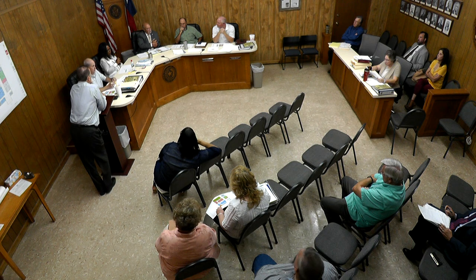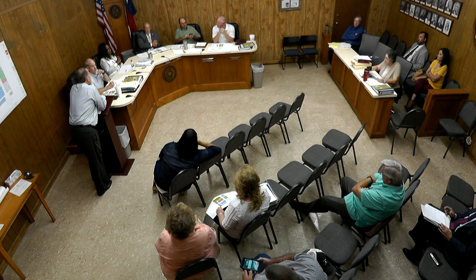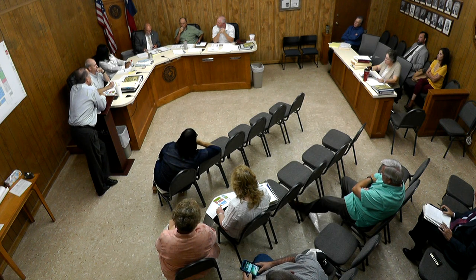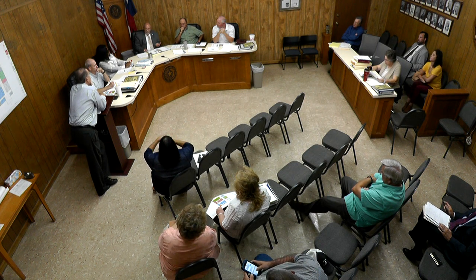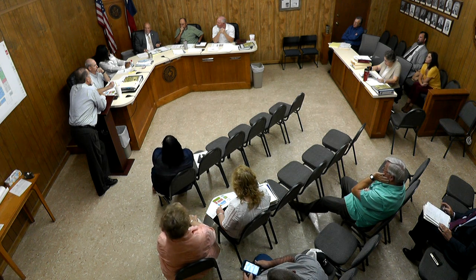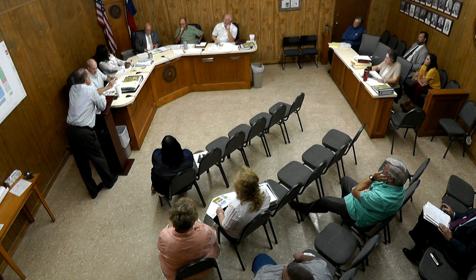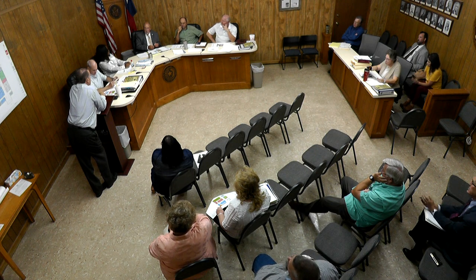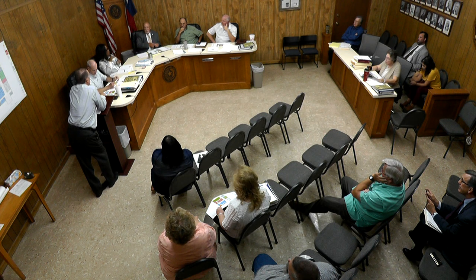I like the idea, Mary, of paying for it all at once, but I'm not opposed to looking at our options also. Because if this other 15,000 square foot kind of brought down is $325 a square foot now, or $300 a square foot, and we hold off 2 years, 3 years, 5 years to do it, what's it going to cost? You don't have a crystal ball, I get it. But if you just look at inflation and things, what's it going to cost us then? Well, escalation is probably in the 5% per year range. Mm-hmm.